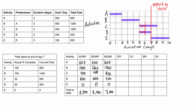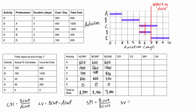CPI is the cost performance index, CV is the cost variance, SPI is the schedule performance index, and SV is the schedule variance. For the overall project, CPI equals BCWP divided by ACWP: 2,400 divided by 2,700 gives us 0.889. A CPI less than 1 means the project is over budget.